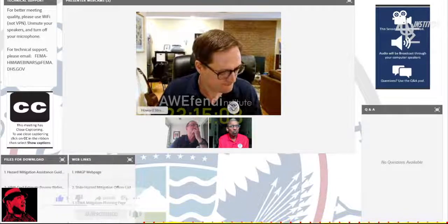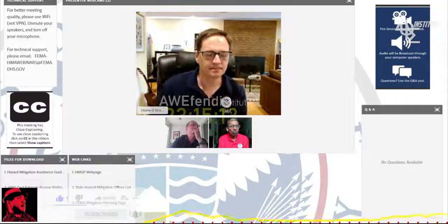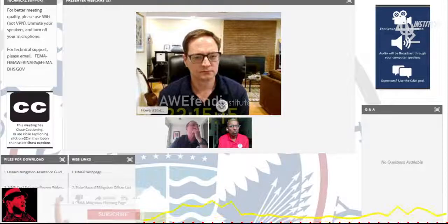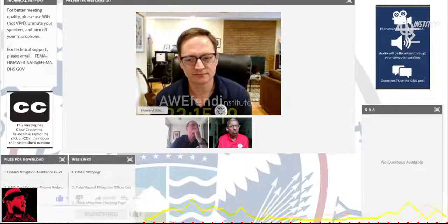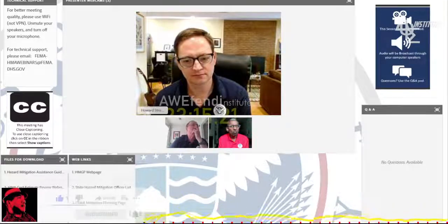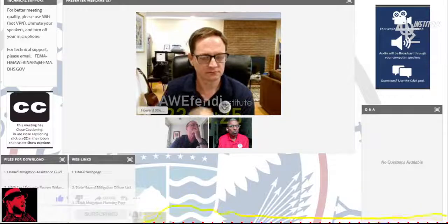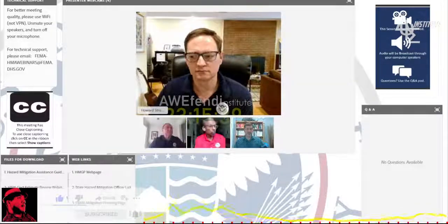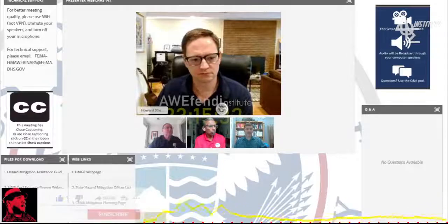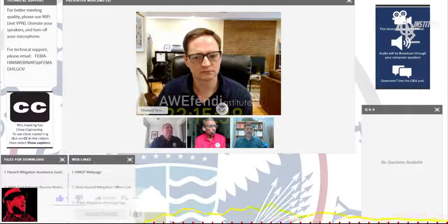Okay. As we saw on the slide, the starting point, of course, would be to look at the regulation itself. And you don't have to go looking for the regulation. It's there in the slide deck verbatim, as I said. But there are a wide range of items that can be in a cost estimate, so understanding all the items and if each cost is reasonable can be a challenge. In reviewing an estimate, the best practice is to focus, as we alluded to in the slide deck, on the big ticket items. Remember the $1 million cost items.